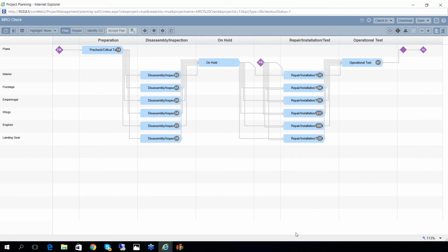And in maintenance and repair and overhaul, for every repair that they do or every piece of work they perform, they have something called a work card. So there are 700 work cards inside this project plan, representing about 200 days of duration and give or take about 70 to 100 people working on the project through its life.